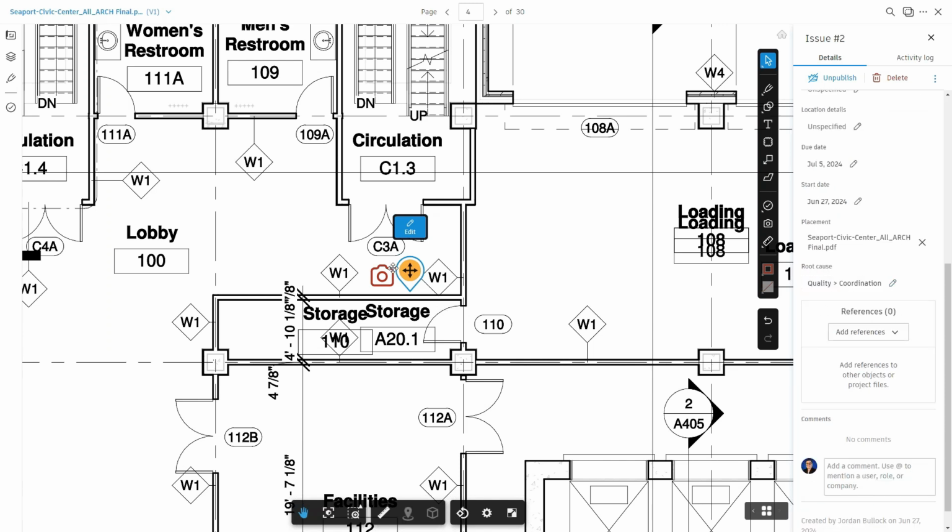And then what's cool about these is, rather than having to have a photo node and an issues node, you can actually add a reference file directly in here. So if I want to add a photo, a file, a schedule, an RFI, an asset, a submittal, or a form, you can actually add those directly into the interface. Now, RFIs, submittals, and assets are actually located in the build module. So I have that turned on here. That's why I have access to all of these. But you do have access to this in the build module. I do not believe you have access to all of these within the primary docs. So you will have access, though, to files, photos, and scheduled activities through this module.